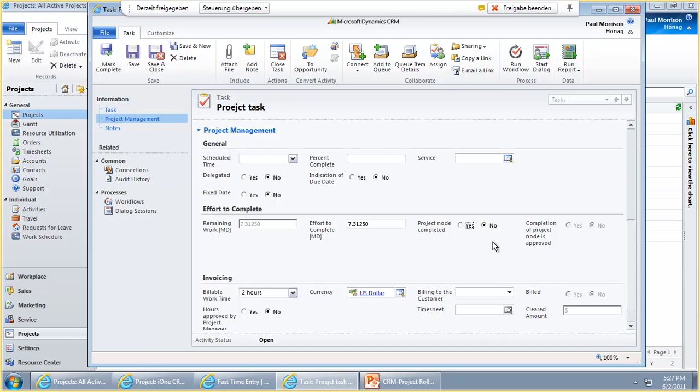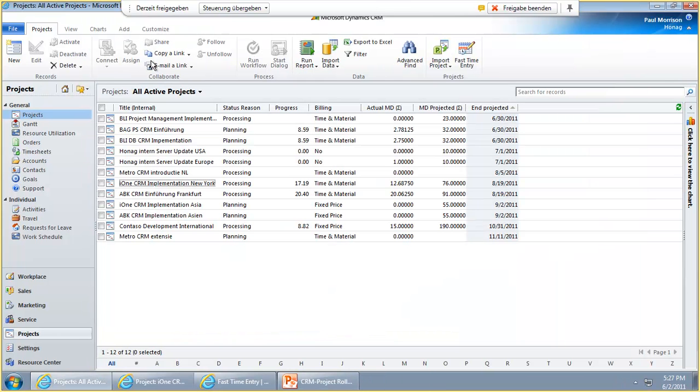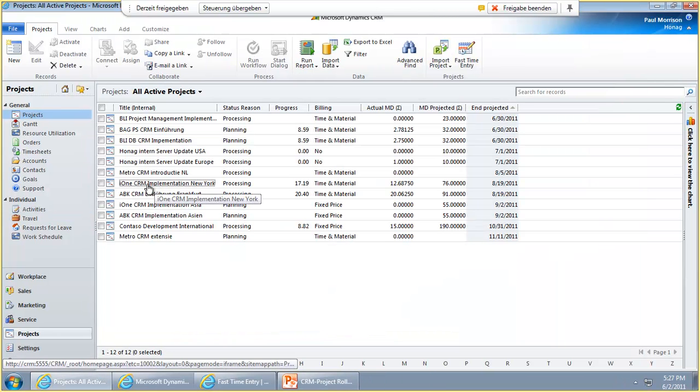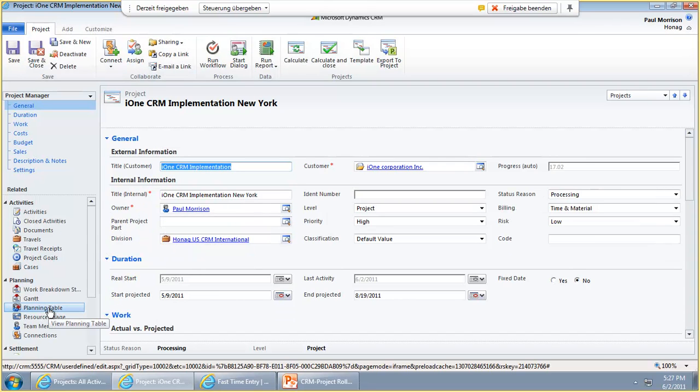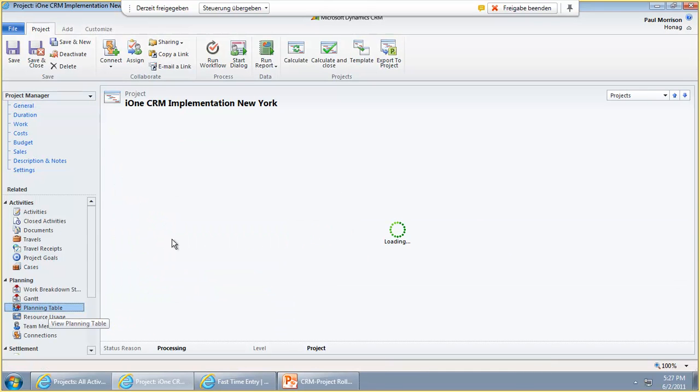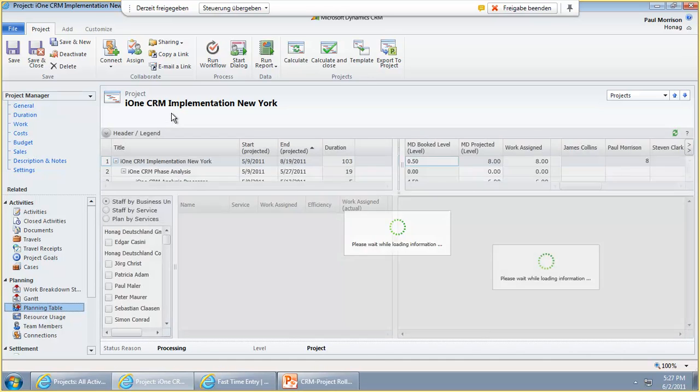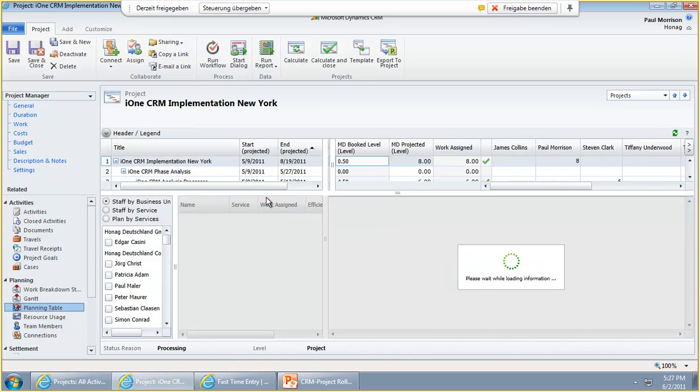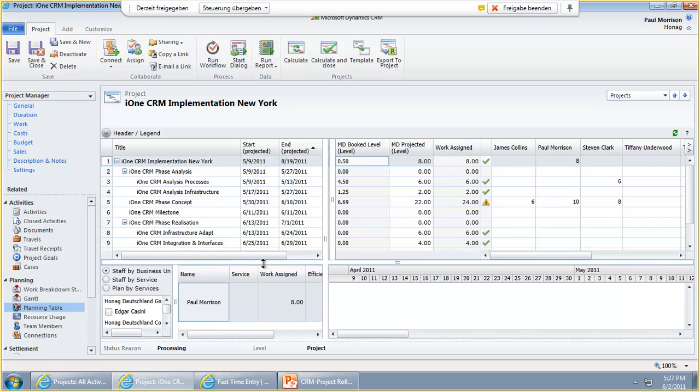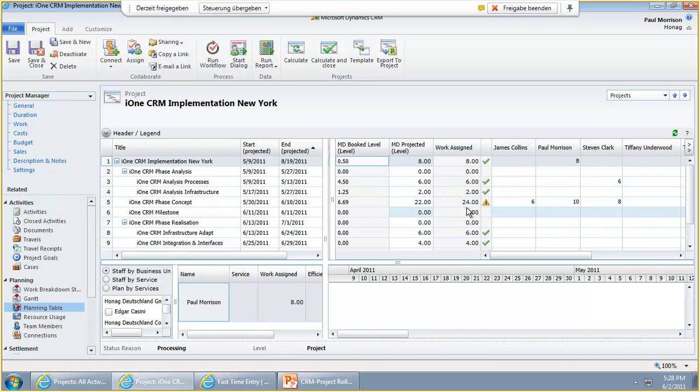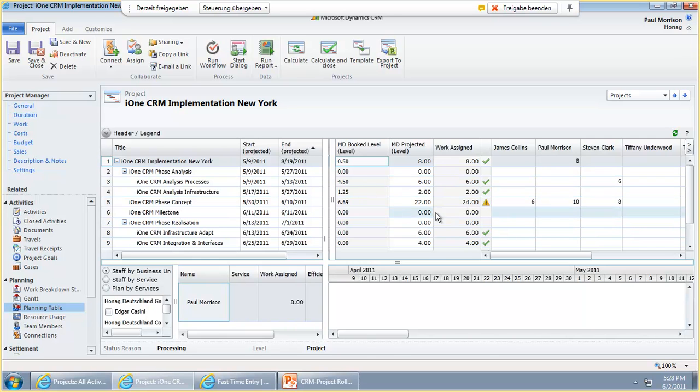It's really a huge functionality that we have here for Effort to Complete functionality for controlling projects. All these effort to complete things are visible here in the planning table. If we go to the planning table of the project where we just raised the effort to complete, then you see in the i1 CRM phase concept we see here the alert symbol that the man days that we projected here, 20, are now raised to 24 in total. This was because of Paul. He entered two days more. So you directly get on this view a very easy information where you have a differing effort to complete.